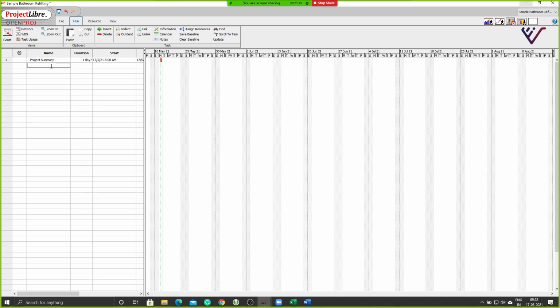Agreed? Yes. Yes, sir. So you would bill the client for plans, sections, and elevations, but you would not bill the client for section A, section B, section C separately. Right? A set of drawings when delivered, you will charge. So a work package can be defined as something which is billable to the client.